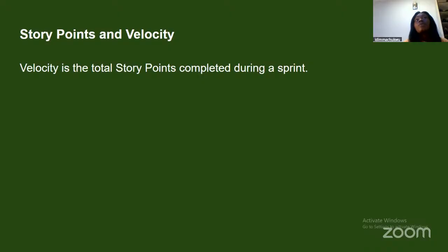Now, you have to look at how this capacity is going to affect the amount of story points you are going to complete. If you were able to do 100% before, that's 10 story points. Now, you have to consider removing 25% and you have 75% remaining, because one of your 4 developers is not going to be available. So using that 75, 75 multiplied by 10 divided by 100 will leave you at 7.5. So you can only complete maybe 8 story points for that 4th sprint.